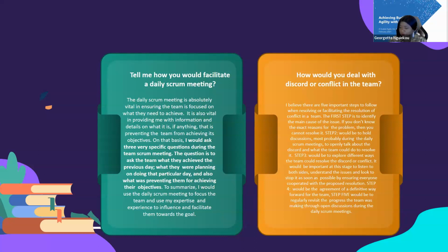But you can just stick to one. You pull up your Rally board, go through the stories, call the names, and they provide their updates. Usually your stand-up is 15 minutes, but you also have a 15-minute buffer just for after-discussion. When you have any discussion that is taking longer, you use the remaining 15 minutes to discuss that, but the update itself is within the first 15 minutes. You can also read here. I'm not reading it, I'm just telling you what I do, right?